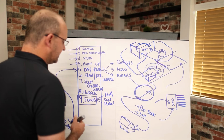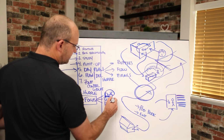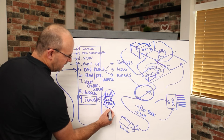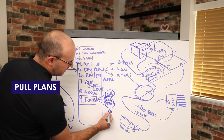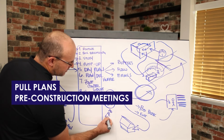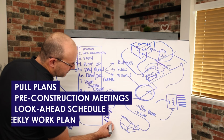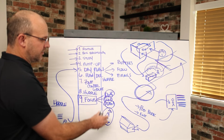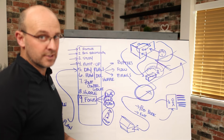As a part of that, like I said, you're in the drawings, you're in the schedule, you're in planning. And as a part of planning, I want you to remember that we're always planning our pull plans, our pre-construction meetings, we're doing look-ahead scheduling and weekly work planning, and looking for problems out ahead and attempting to make work ready and queue it up for the trade partners.